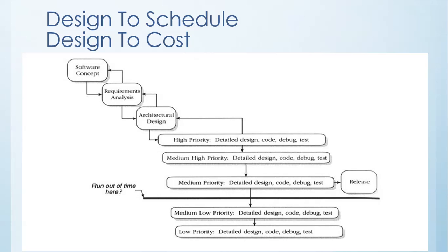One of the critical elements of this lifecycle model is that you must prioritize the features and plan your stages so that the early stages contain the highest priority features. You leave the lowest priority features for later. If the ship date arrives before you've completed all the stages, you don't want to have to leave out critical features because you've spent time implementing less critical ones.